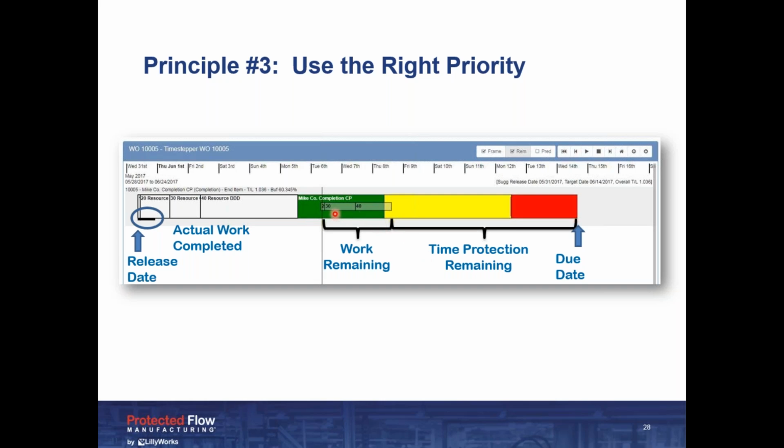On the other hand, if my time protection, my buffer, is getting eaten by time going by faster than I'm reporting the work complete, then the threat level for this job is going to go higher and higher, okay? So we make that calculation and publish it out on the floor. Remember, the flow of information has got to go out to where people can make the right decisions to speed that flow of material.